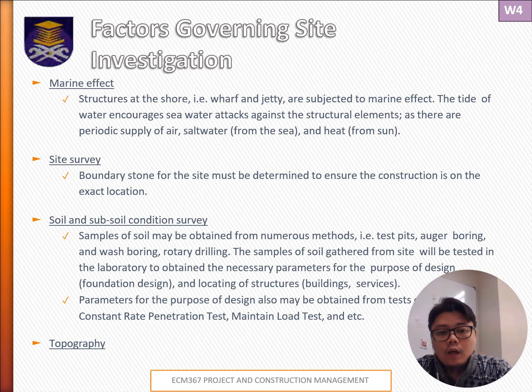For example, when we do excavation, we can reuse the available soil for leveling at some other point within the site. Otherwise, we need to import soil from other locations, and this affects not just the cost but also the future accessibility of the site.